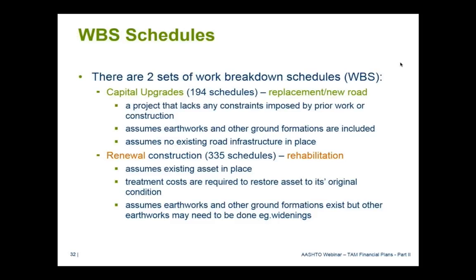So in terms of those work breakdown structure schedules, we have around 194 schedules covering our capital upgrade components, and another 335 schedules covering our renewal or rehabilitation type activities. And they feed into that unit cost component within our valuation methodology.